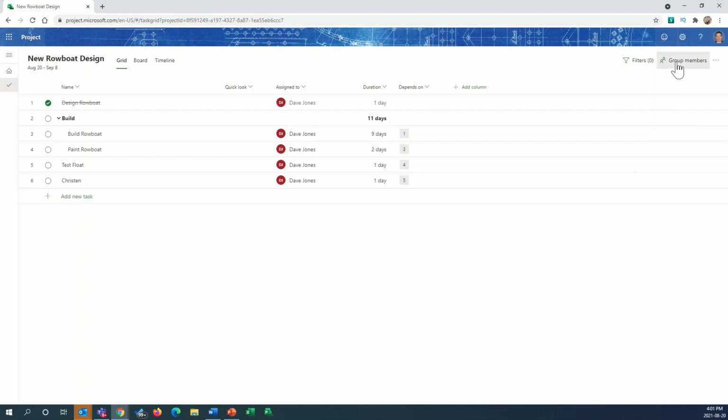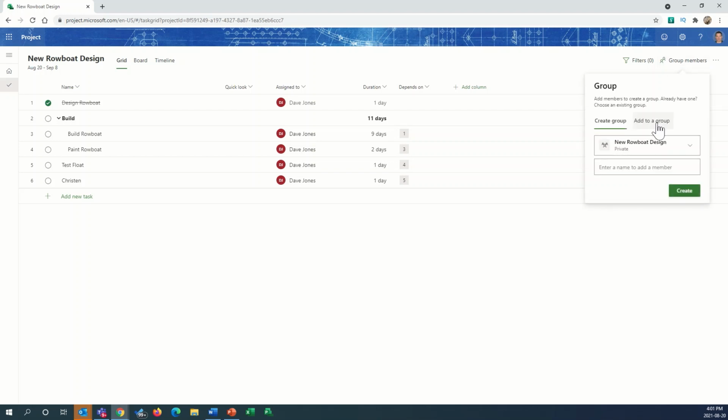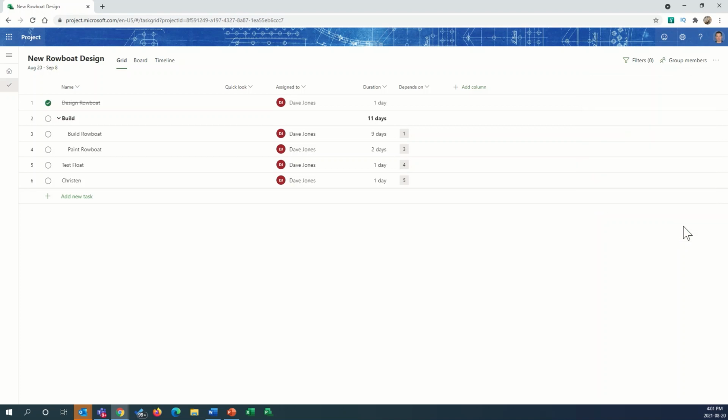To create a project team, you're creating or using an Office 365 group. In that light, Project for the Web uses the same permission system as the newer Office apps and Microsoft Teams. However, Project for the Web doesn't afford you the same granular level of permissions as you have on the Microsoft Project Online system. Anyone with access to the project can modify your plan. Again, there's no backup.